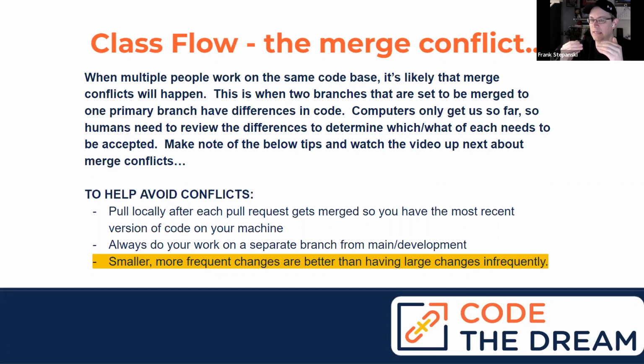By having it done that way, the client can see each version a lot earlier and say, okay, maybe after this version, add these new features. So that next sprint, 2 weeks later, we can add these new features, as opposed to having to figure out everything the application has to do at the very beginning. Then through those 3, 4, 5, 6, 7, 8 months with a non-agile approach, you wouldn't really see the end. Or if you did, you would say, maybe I don't want this. Well, that was already approved at the very beginning. We can't change it now, or if we do, it may cause some problems.